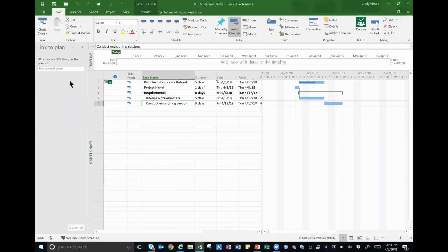So this time, let's link to the one we just created. Now, I do want to tell you that when you create a plan in Planner, it does take a bit of time for that plan to become available for you to do this link. I think we've had enough time, so it should be fine. We're going to try it. But if it doesn't work and you know the plan is there, just give it some time. And keep in mind that the project must be published in order for you to do that.